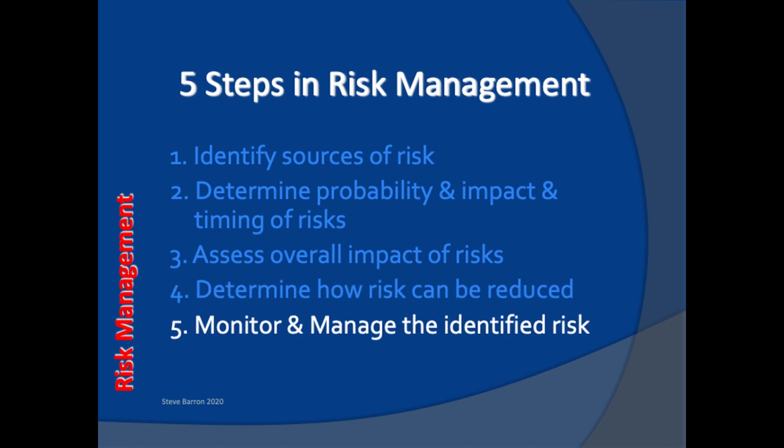Once risks are identified, assessed and prioritized, with appropriate methods of dealing with them designed and included in the project plans, risks must be continuously monitored and managed through to the end of the project. There must be a management method for monitoring the status of each risk and taking appropriate management action, whether this is invoking contingency plans or closing down a risk. It is important to continually seek new risks and bring them into the risk process as early as possible so that they can be properly managed to avoid damage to the project.